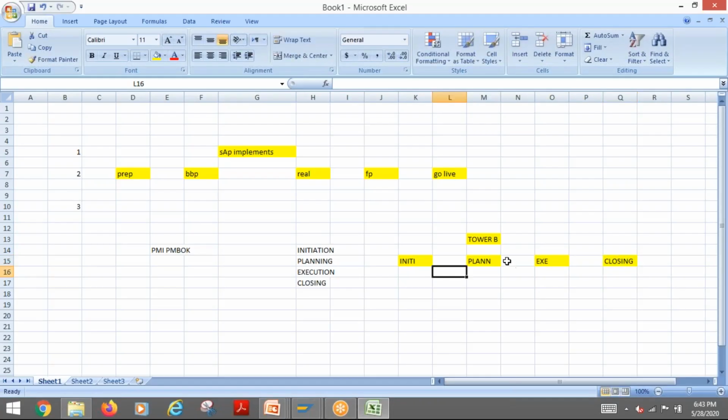So basically level 1 and level 2 will give you the 100% scope of the project. Obviously level 1 represents 100%, but it will not give you any detail, but level 2 will give you the total outcomes. So whenever we structure the WBS element, what we need to consider is level 1 is the project, then level 2 will be your methodology. For example, this is PMBOK.